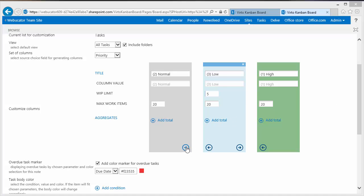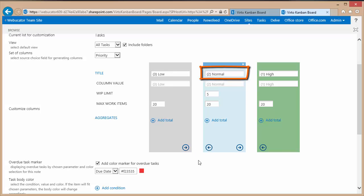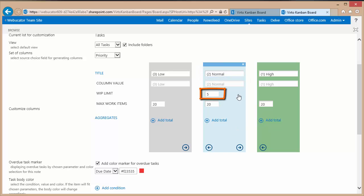I'm going to set it back to the normal priority being in the middle column. Now in the middle column I have a work in progress field property which is currently set to five. And that number indicates how many items I can have in progress. If I exceed that number then the top column's title will be displayed in a red font. So that's what that number would apply to and I will show you that when we get back to the actual view of the list.